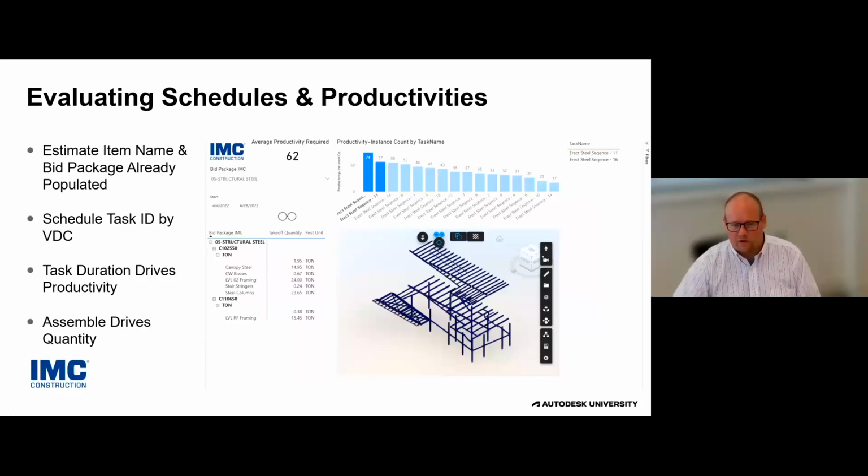And another one is the very traditional slab on deck structural steel framing for the level, which is fairly simple. You should have a higher productivity. So between these two, yes, I can see that there would be a difference in the productivity, but they're actually backwards. The piece count is higher in the one with the canopy and the columns, so the productivity that they need to hit is higher. We should actually be increasing the duration of that rather than saying to the structural steel erector that they need to hit a higher productivity. And that's, here again, allowing us to plan better and have better execution on projects to deliver those reliable results to our clients. And if you click one more time,